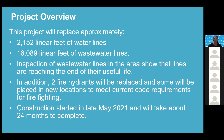Thank you, Ms. Emily. To give a brief project overview: this project will replace approximately 2,152 linear feet of water lines and 16,089 linear feet of wastewater lines. Inspection of wastewater lines in the area has shown they are reaching the end of their useful life - that's the reason for completing this project. In addition, two fire hydrants will be replaced and some placed in new locations to meet current code requirements for firefighting. Construction started in late May 2021, and the project will take about 24 months to complete.